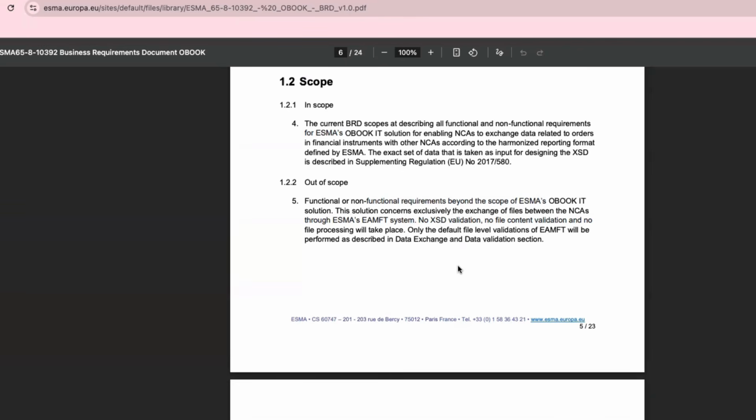Then you have to inform immediately after the call is over. Please inform your project manager and your scrum master. Loop in all your scrum masters, product owners, the lead engineer, architects, everybody, and tell them, as discussed in the earlier call, business is asking for a change, and attach this BRD. Then you say, in this BRD, we don't have any of the requirements listed. This BRD was reviewed and they provided sign off like 3 months ago.